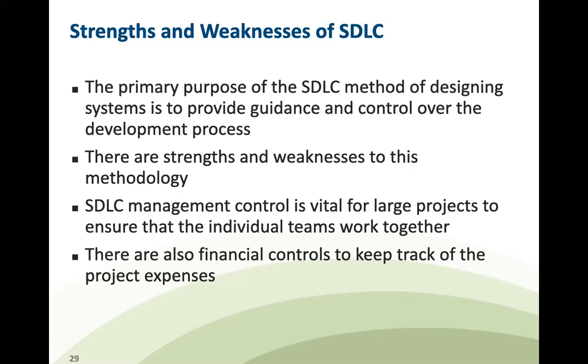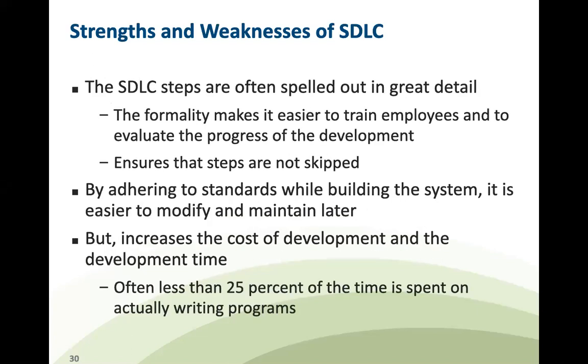There are also financial controls to keep track of the project expenses. So within SDLC, you can incorporate financial control so that you can keep track of the project expenses. The SDLC steps are often spelled out in great detail. The formality makes it easier to train employees and to evaluate the progress of the development. So SDLC is a formal methodology, right? It makes it easy to train employees because they also have an idea how this system came into play, because it underwent so many stages, right? And to evaluate the progress of the development.